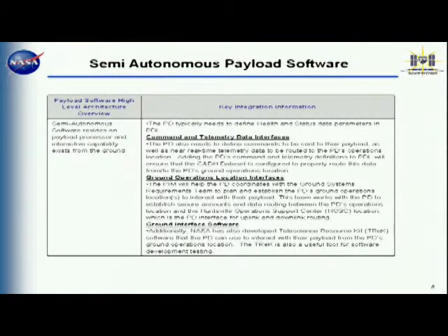Also, if you plan to have this interaction with your payload from a remote ground operations location, you're going to do some coordination with the ground systems requirements team. That'll happen fairly early on during your integration phase. They will work with you to coordinate requirements for your remote location, to establish a data feed to your location, to set up accounts for people who are going to be issuing commands and working with the HOSC to get the data going.